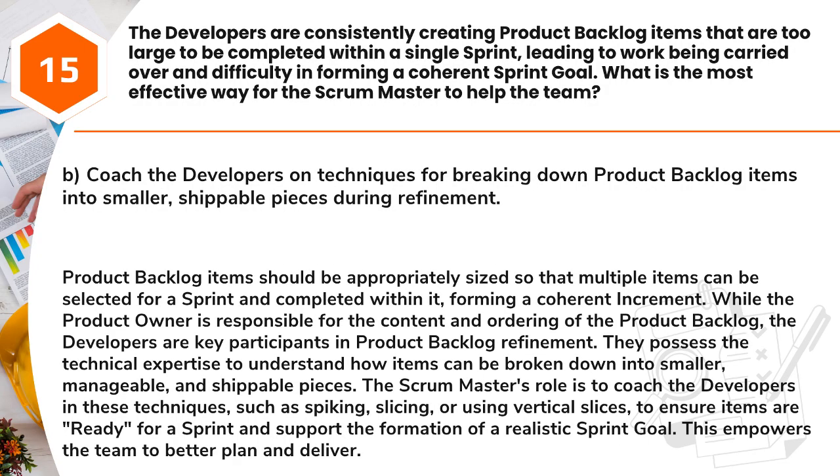Answer: B. Coach the developers on techniques for breaking down product backlog items into smaller, shippable pieces during refinement. Product backlog items should be appropriately sized so that multiple items can be selected for a sprint and completed within it, forming a coherent increment.